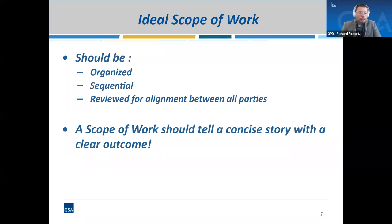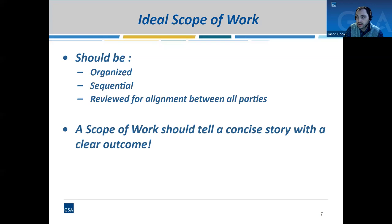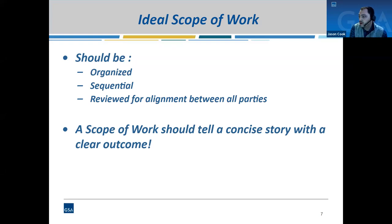When developing our ideal scope of work, we need to make sure it is clear and understandable. We look for it to be organized — ideally in an industry standard form — and sequential so it is logical for users and stakeholders to understand. We also want to review alignment between stakeholders and all parties involved in the project, making sure all requirements are accounted for in the scope of work, whether through assumptions or a risk assessment. The scope of work overall needs to be concise and tell the story of the project so we can understand the costs associated with all the work included.